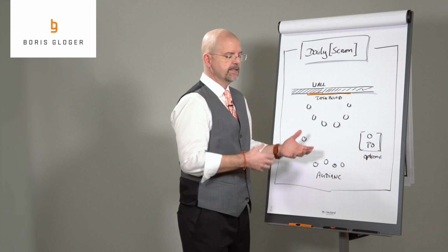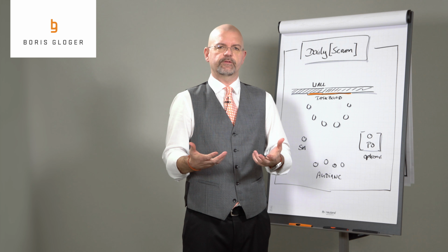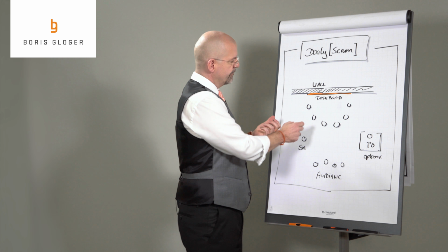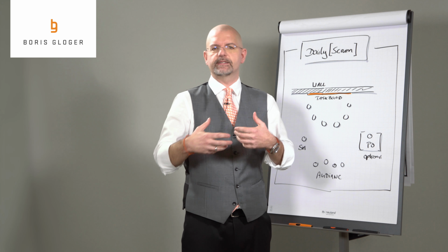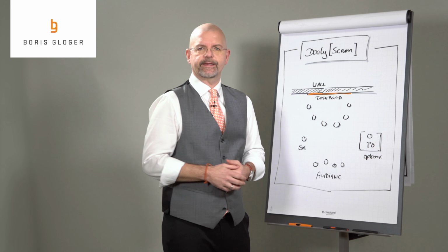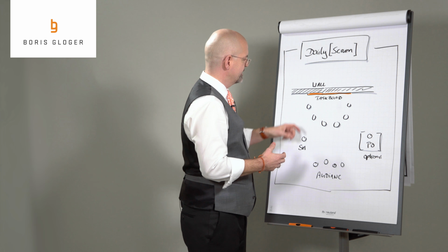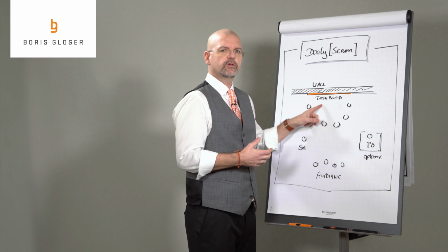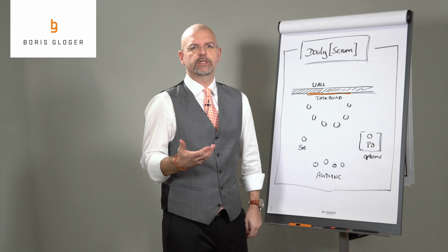One reason is he's not the one who has to deliver any of these tasks. And if one of the team members reports to the Scrum Master, you see that he still reports to the Scrum Master because he has to turn his neck. The real purpose of that meeting is that these people talk together about what needs to be done to be able to deliver the functionality by the end of the iteration.